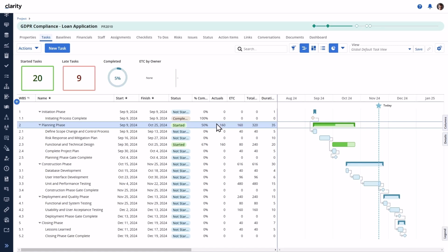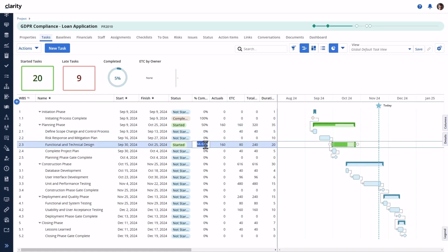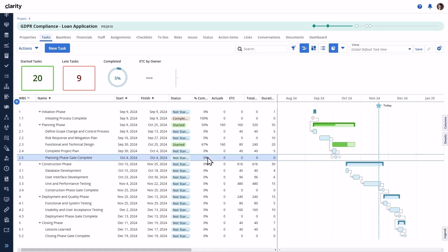The summary task is computed for the total actual hours divided by the total effort hours for all the subtasks to get 50%. Each time actuals are posted, the update percent complete job should be executed thereafter to update all investments. The manager cannot make updates to any regular task or summary task. The amount will revert to the existing value.